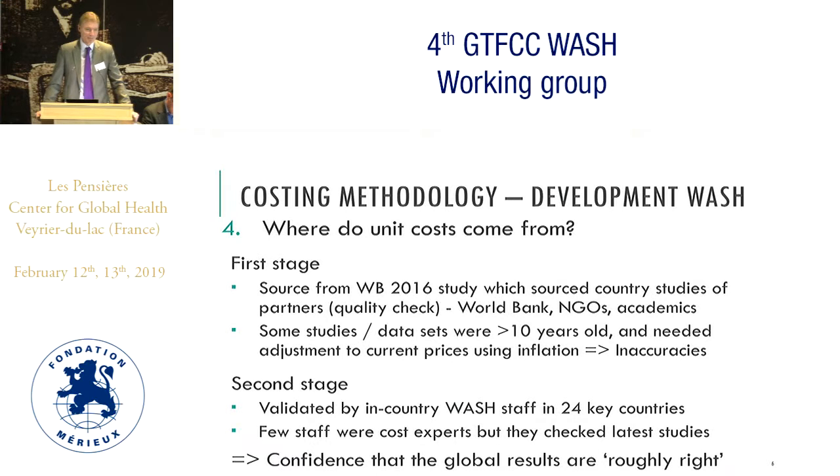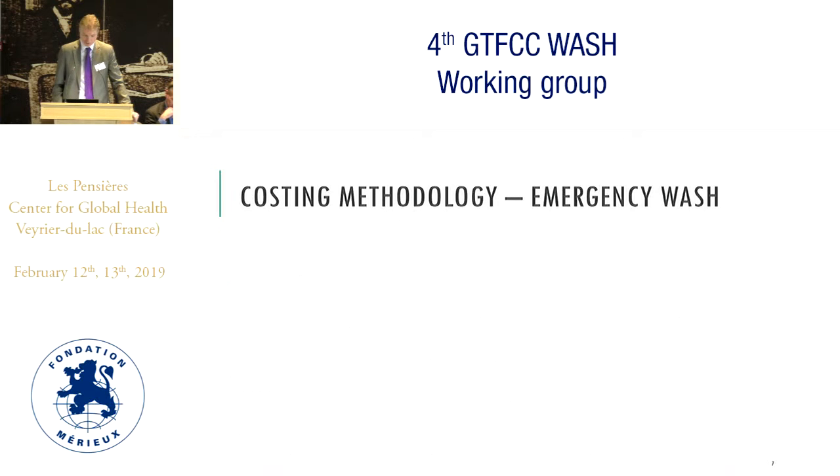So we have confidence that the global results are roughly right. We could produce a confidence interval around the 65 billion, but we have some confidence in that overall number. But when we break it down to country level, there may be some significant inaccuracies, and that's why we're proposing countries use the tool themselves and introduce their own locally validated numbers, especially on the unit costs. So that's development WASH.